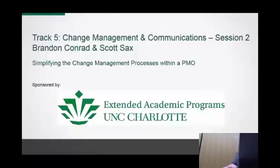Most of our changes do get approved, and what happens is the stuff that gets affected is where the challenges really come in, and that's where a lot of gentleness has to come into play. And then we update our portfolio, and this all happens within 24 hours. Or at least we try to get it within 24 hours, because by the next meeting, mindsets have already moved on. And we still want to keep them in the loop.